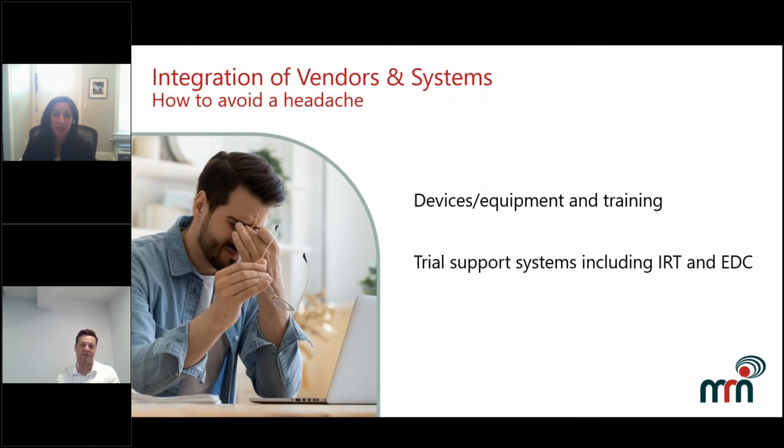If you have that one healthcare professional who says, I'm the one interacting with the patient to schedule the visit in the home, I'm then coordinating with the site to let them know when that visit is going to happen, I know when the courier is going to pick up investigational product and deliver it, and I know when the courier is going to drop a lab sample off at the local or central lab. Because if any one of those things we talked about earlier, like the risks, any delay, traffic, weather, all of the things, the courier would just contact that one healthcare professional.